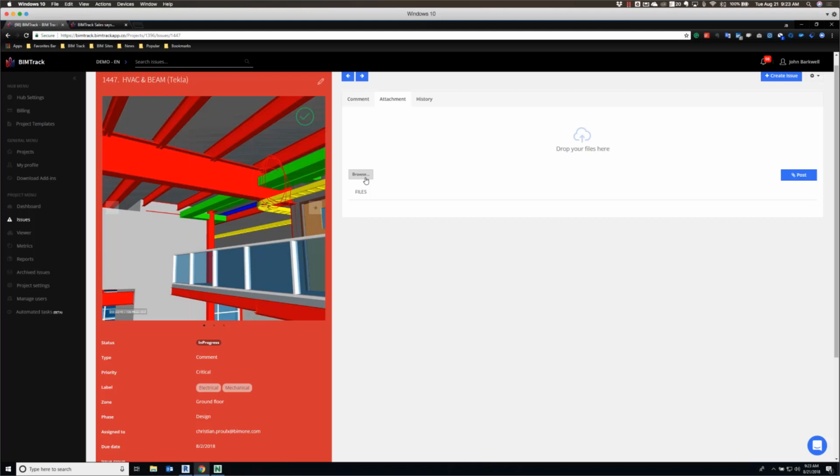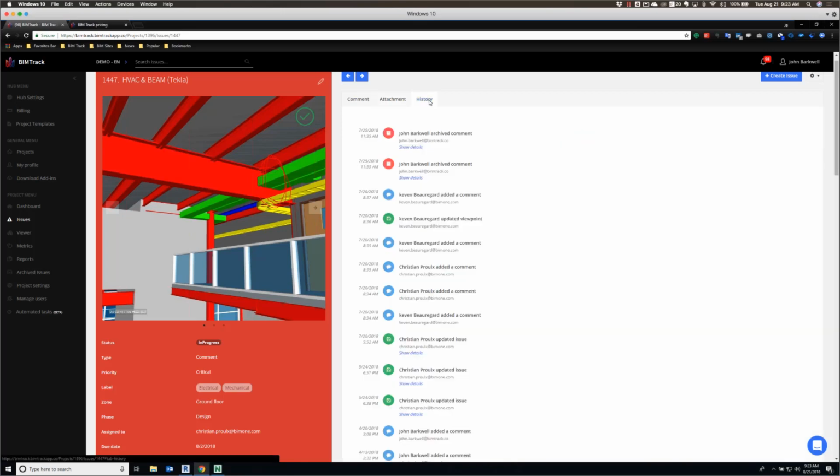We're enriching the model so that we can then export this out to maybe a COBie compliant export to be consumed into Maximo for a handover to an owner. So, this is kind of the final step of BIM because we have model information there. Now we can enrich that model for that 30, 40 years that asset is going to be in existence. And typically, as most of us know, where most of the cost is incurred.